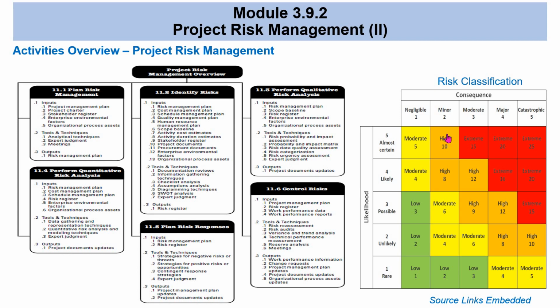And the ones with minor or moderate impact, but maybe with a likely possibility of happening, or they may or may not happen, but even if they are unlikely, if it's really with a major impact, then you rate them as high and you can define ways to solve them. That depends on the matrix you want to use to classify them, but it's important that you classify them. And then you do this while applying the several processes of risk management, like first planning your risk, making a plan for how to manage your risk.